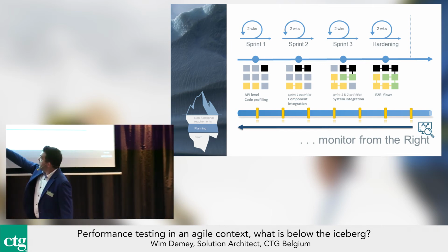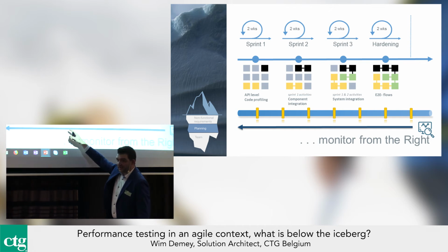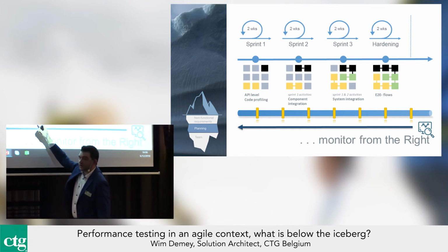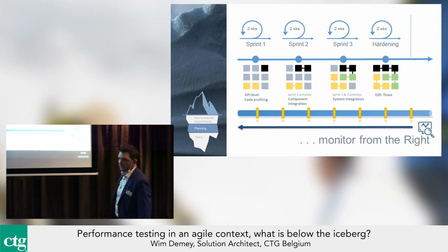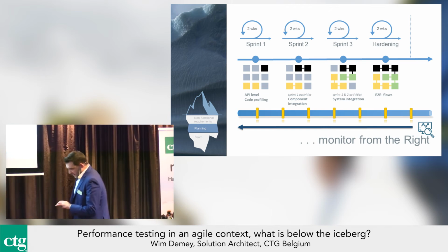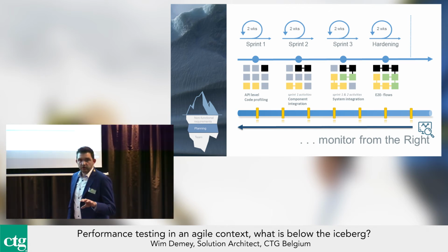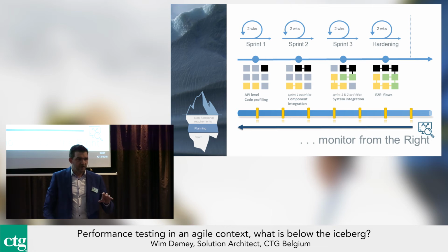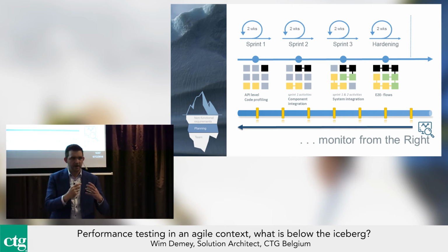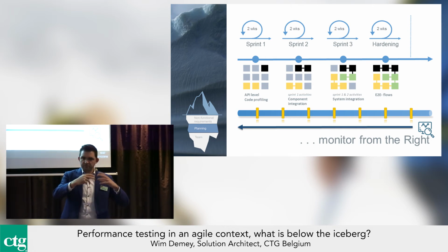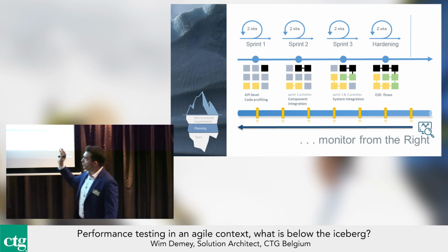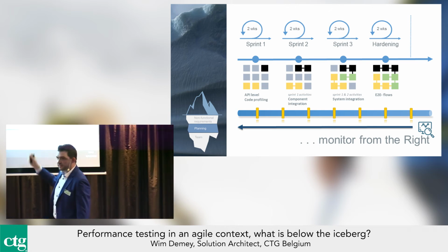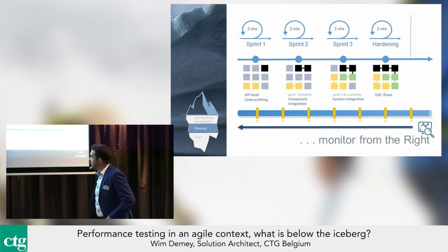But when you add additional features, then here again, you need to ensure that your performance requirements are still met. So, and that means in terms of planning, you need to foresee in each sprint a kind of, I call it a kind of tax, a kind of fixed user story points to do performance testing in an iterative way.